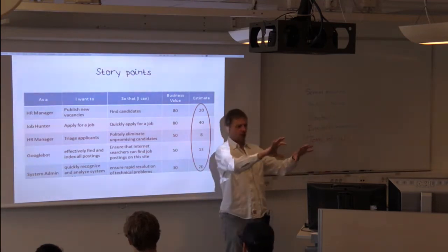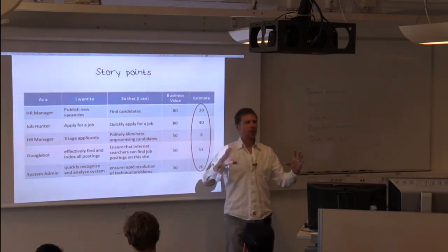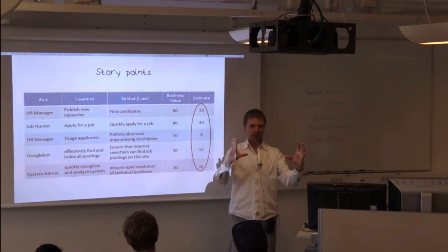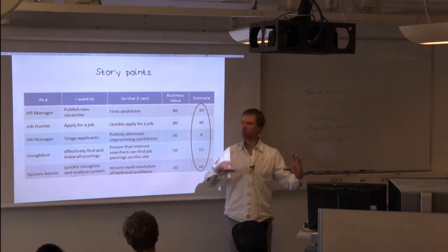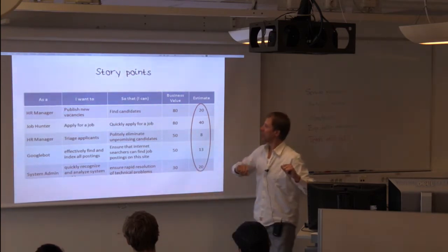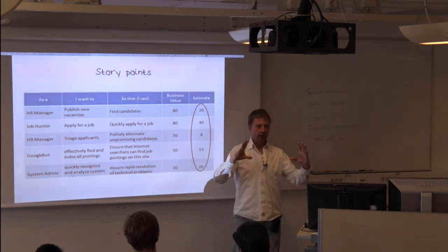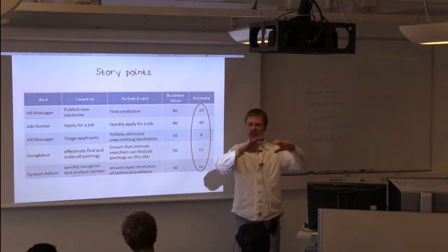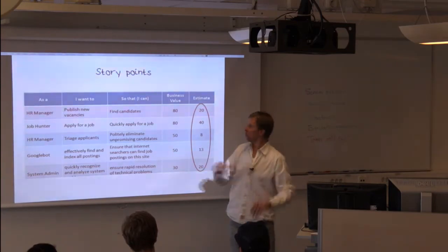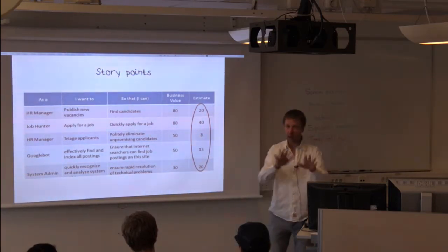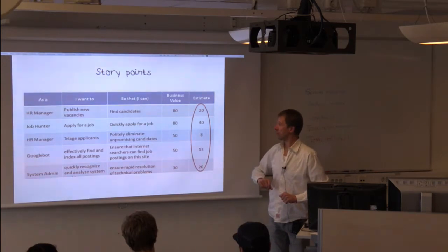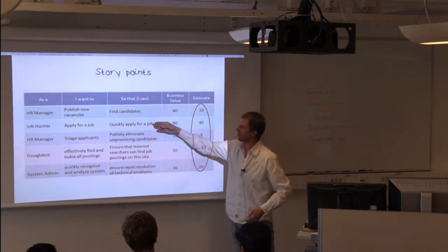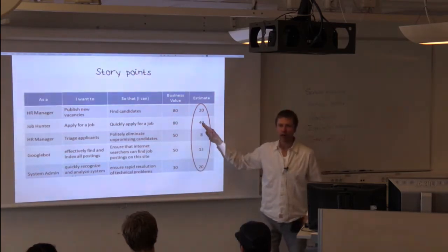we need to change the database server, whatever it is that we need to change, right? So we have some understanding of the size of that job, the effort necessary to pull off this story. Now, when we look at this story, we estimate that it's about twice as much work that needs to be done. About. So we give it a 40. Right? For now, that's fine. So this says that we think this is going to take twice as much effort as this one. Not talking about time, effort.